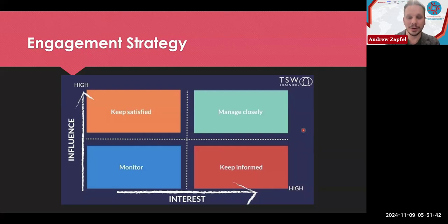But when we're thinking about stakeholders, usually the activity we like to do internally in organizations or with a small group working on a strategic plan is to first just completely brainstorm all of the stakeholders you plan on working with as an organization to achieve what you want to do. And it just takes maybe 5, 10 minutes, maybe 15 minutes for discussion afterwards. Having everyone just on a big white paper in a room, just list every organization you work with: community-based organizations, ministries of health, ministries of education, healthcare providers, health facilities, maybe community health workers, just list off all of those different groups that you work with.